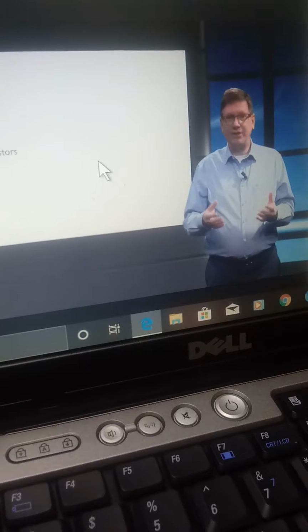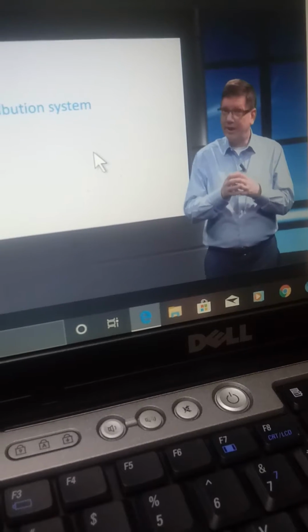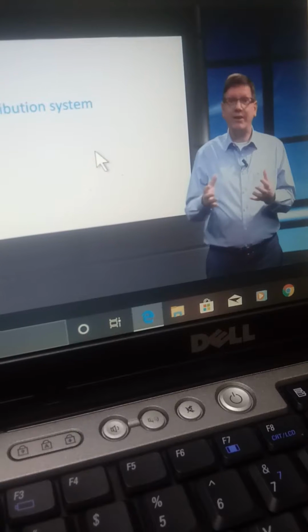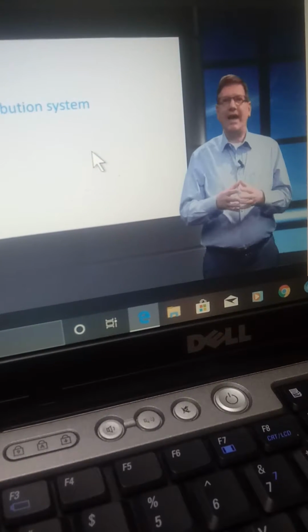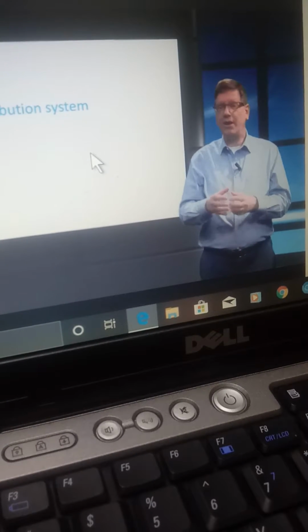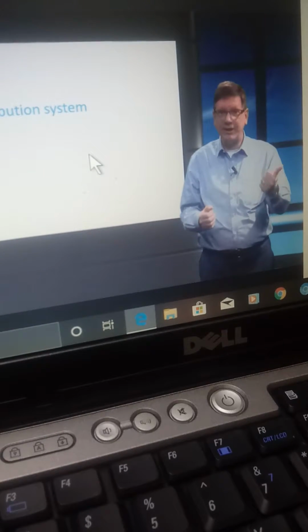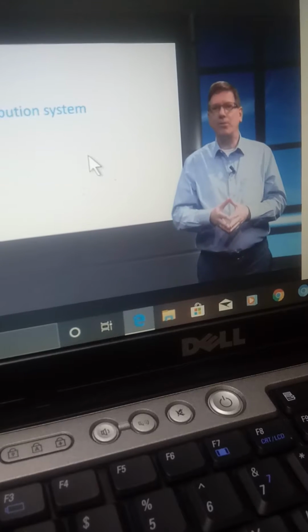Project finance is essentially a risk distribution system. All the risks that are retained by the project company, by the SPV, will increase the funding cost or may even make the project financing fail. We just saw that. So we go to great lengths to allocate the risks to other parties. We try to allocate the risk away from the SPV to a party that is best able to assess and manage a particular risk. Let me give you some examples of this.